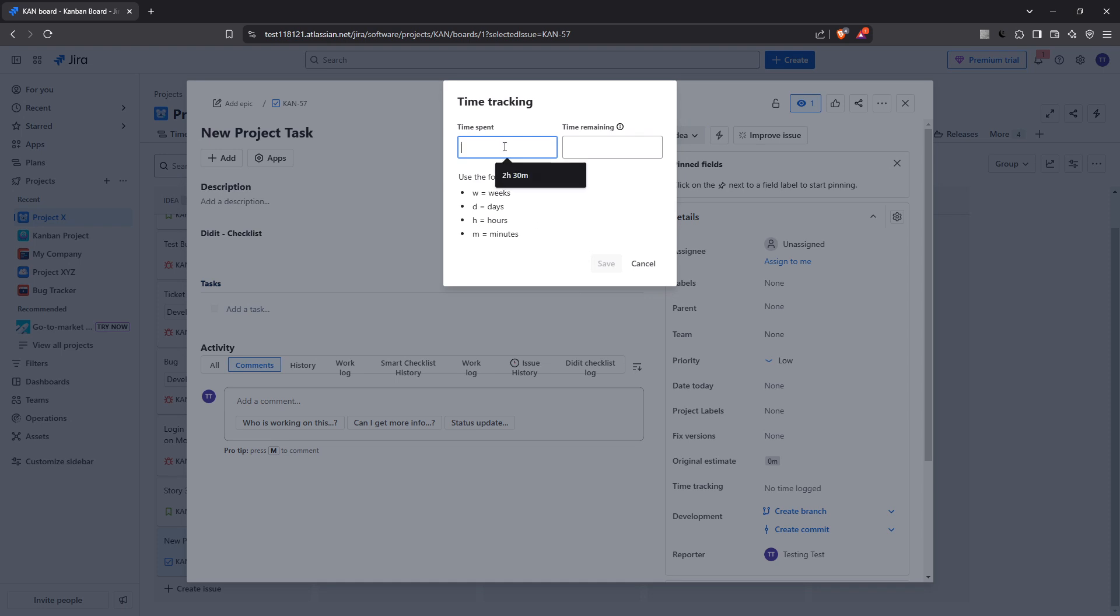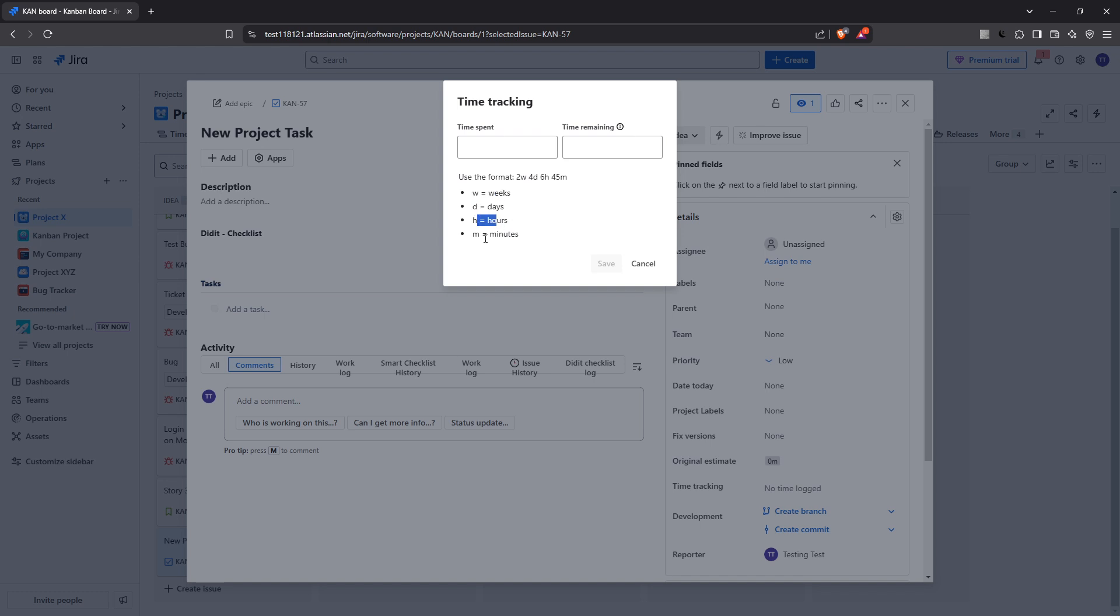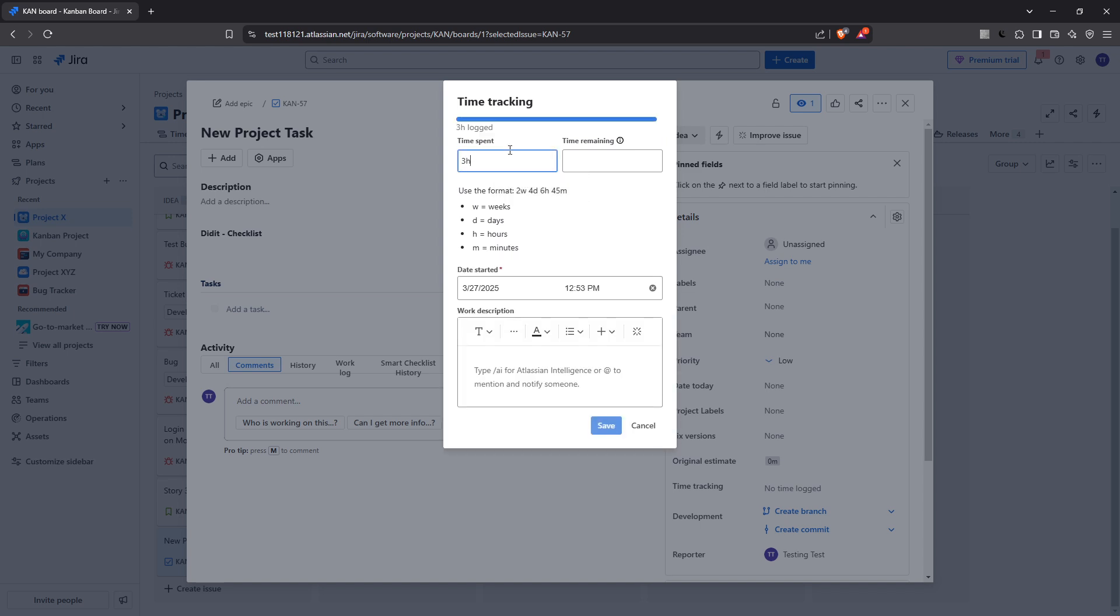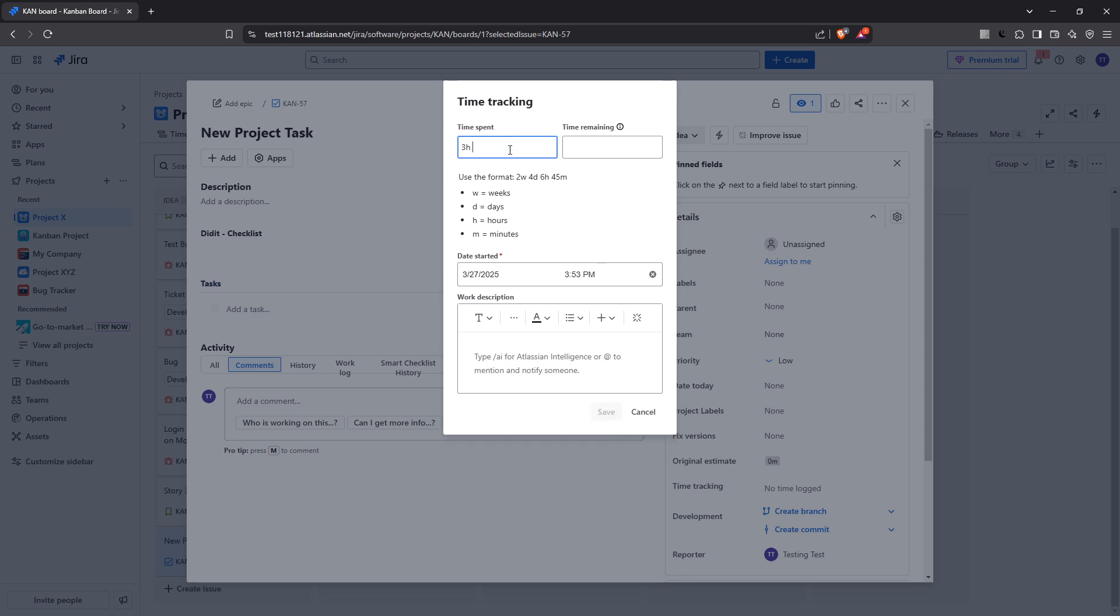Once you've selected log work you'll be prompted to enter your work details. This includes a few key pieces of information starting with the time you've spent. It's important to enter the time in the HMD format where you can note hours, minutes and even days. For instance, if you worked for three and a half hours you would enter it as 3H30M. This format ensures clarity and consistency in how time is logged across all tasks.